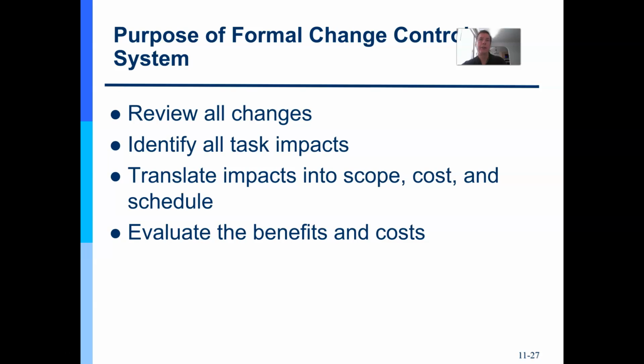So you'd have you on the board and a voting member, the sponsor of the project who funds it, the higher senior leader, they will be on the board and a voting member clearly, a functional manager who is your source of expertise, who's reviewed the change, would be on the board and a voting member, right? We've talked about all of those organizations already. And you'll want to have an executive summary, right?